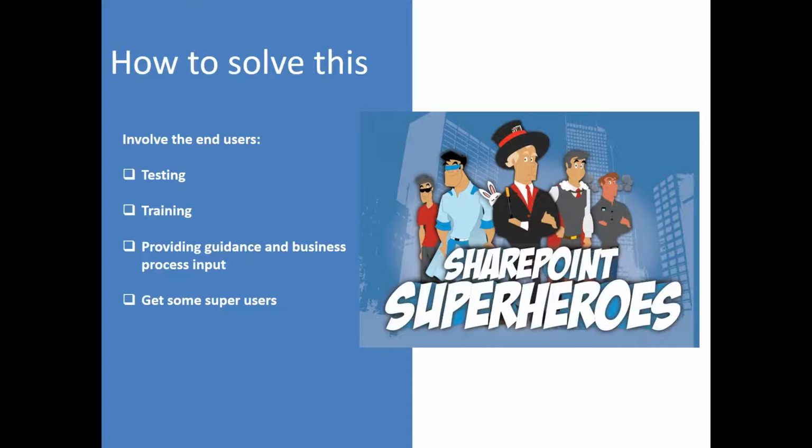If you have some SharePoint superheroes, all SharePoint projects or migration projects or any other project will go that much easier. You need to get some end users on board who start to use the system really early, and who are part of the project from day one to the finishing of the project, because then they will get involved. They will be much more accepting of changes if they're involved. So this is something you really need to do.